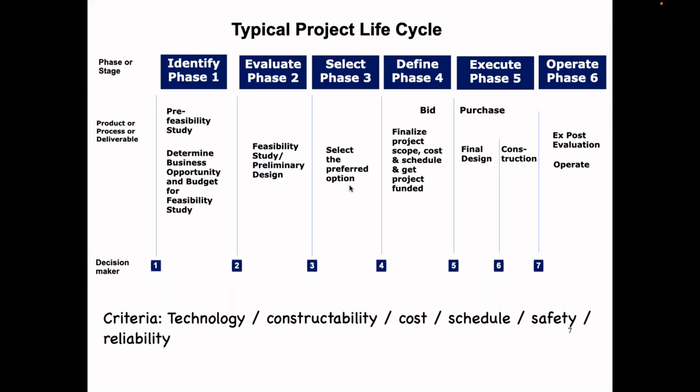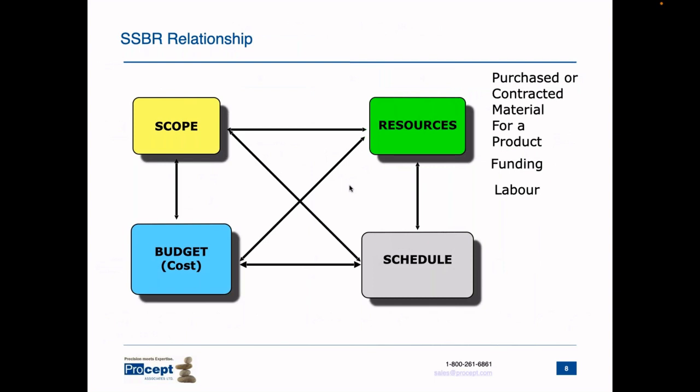Another issue is what's the driving criteria for the project. If it's cost, that should be reflected in some of your contract clauses, and the project needs to set criteria for decision making. For a fixed scope you have a fixed schedule, fixed resources, and fixed cost — the relationship is balanced. If one of these changes, you have to look at the other three to see if they change. Keep in mind, the scope is the physical work of the project plus the work outlined in the clauses in your contract documents. Poorly written documents mean poor scope and problems in the field.